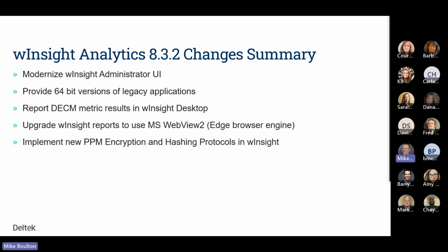So the route to that will be if you're bringing in a DCDE transfer file from Cobra. If you're taking that to Acumen in order to calculate metrics, then you can then take that same DCDE from Acumen and load both the Cobra data and the metric data in wInsight, and then all wInsight users would see Decca metrics related to their projects.